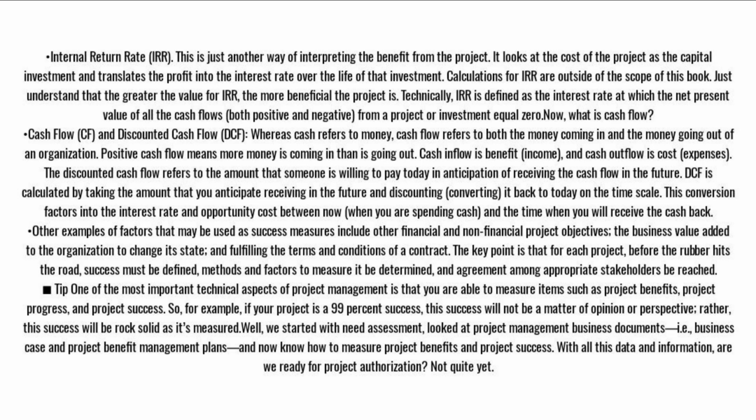Internal return rate, IRR. This is just another way of interpreting the benefit from the project. It looks at the cost of the project as the capital investment and translates the profit into the interest rate over the life of that investment. Calculations for IRR are outside of the scope of this book. Just understand that the greater the value for IRR, the more beneficial the project is. Technically, IRR is defined as the interest rate at which the net present value of all the cash flows, both positive and negative, from a project or investment equals 0.